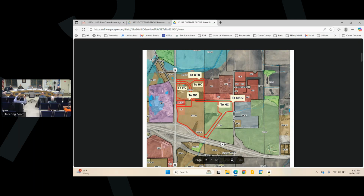Yeah, there's such a great change from here to here. I get it. We gotta break it or step it in between the two lots, but we don't know where that lot line is gonna be for sure. These two lots might be one lot. So we didn't want to take a grade change right out of the middle. Yeah, I hear you. So that's something that's work in process. I don't anticipate you guys would build a wall without knowing what the final designs are gonna be. You might have the space with whoever buys the lot. These grades are still getting tweaked a little bit here and there.